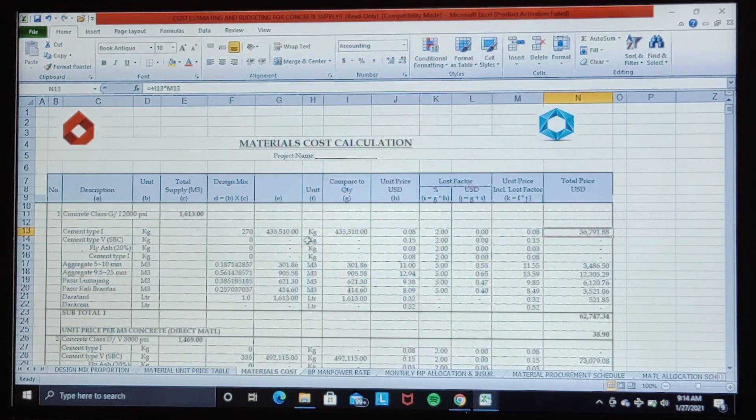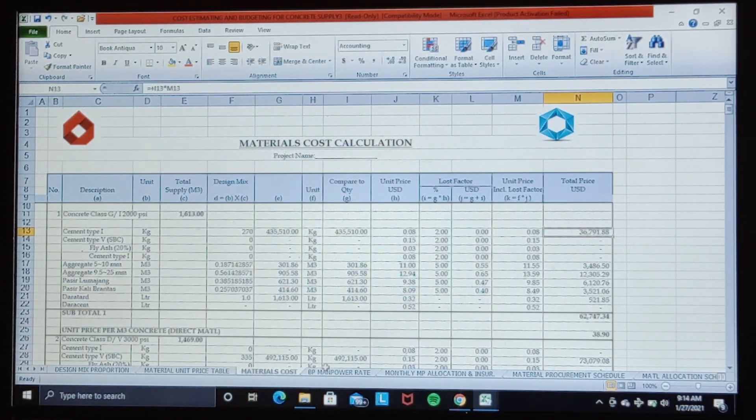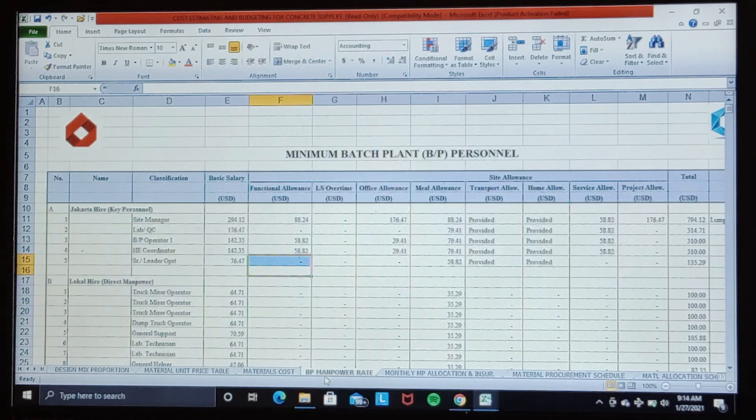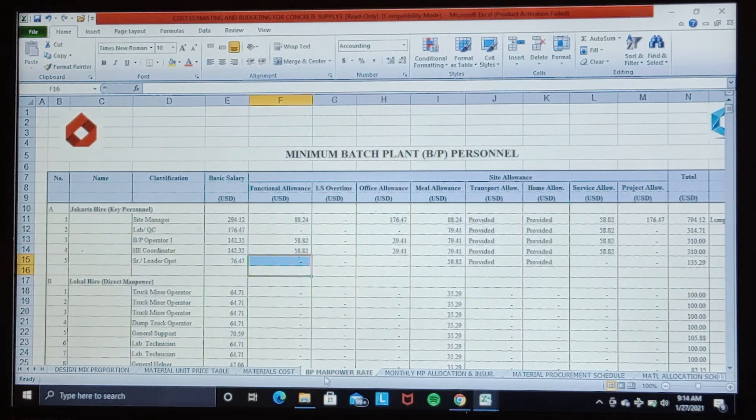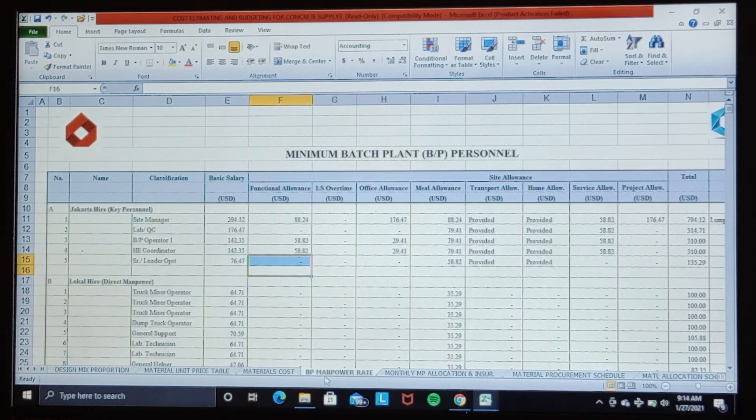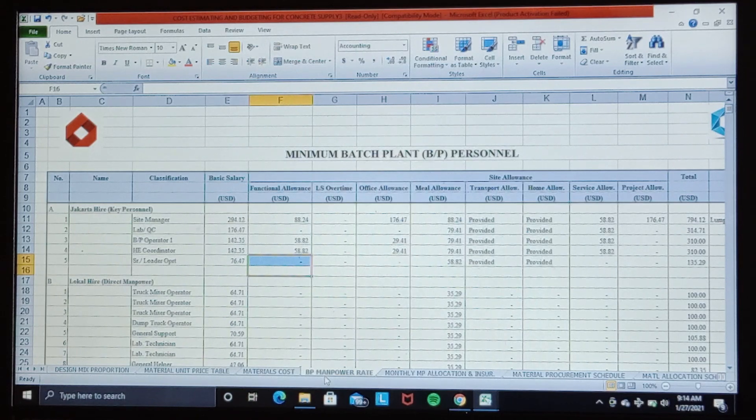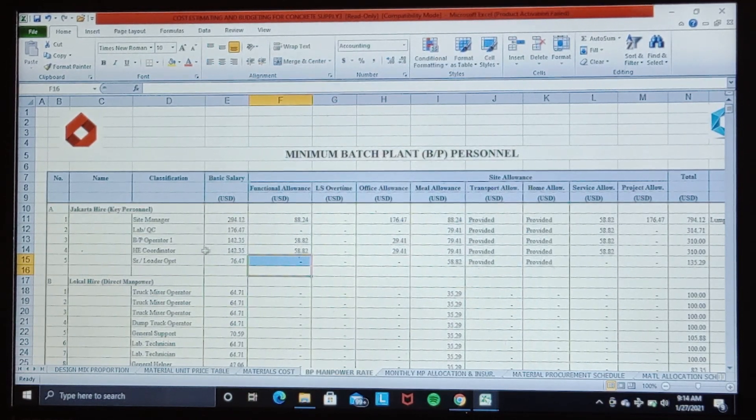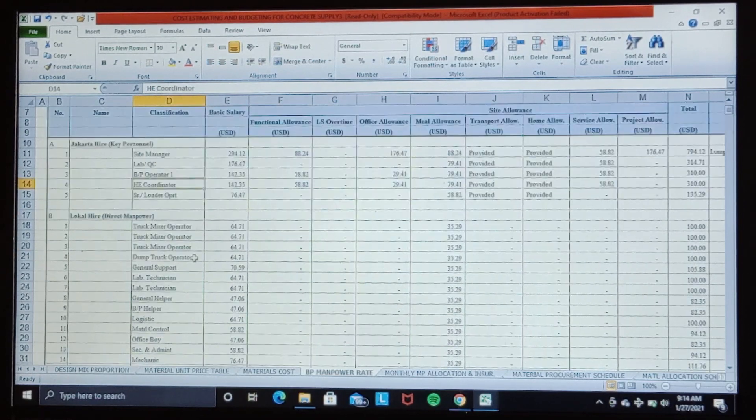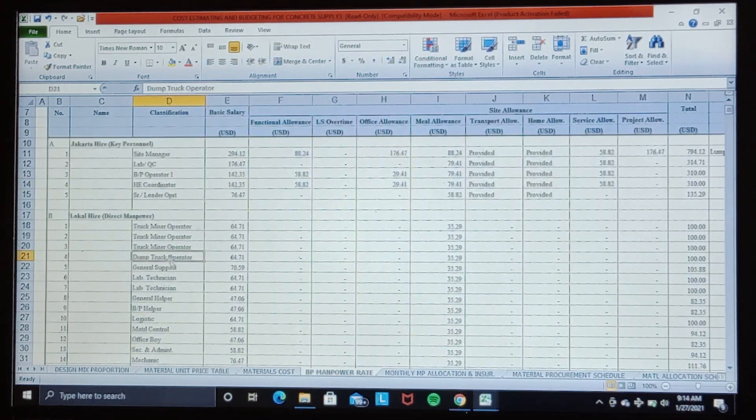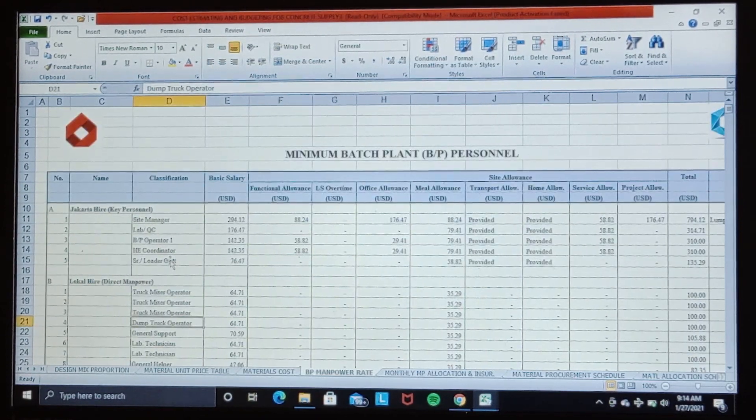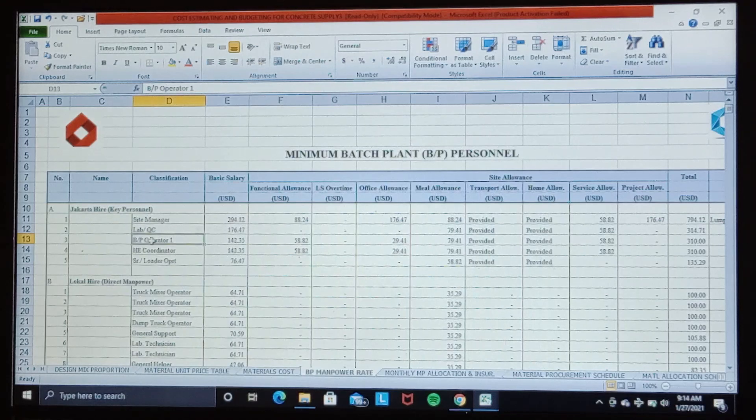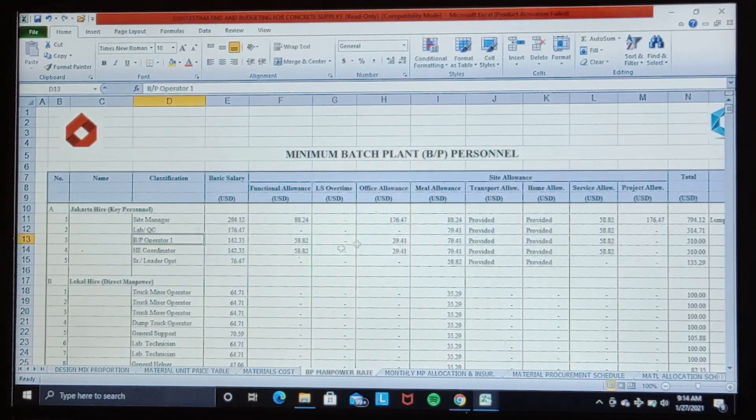Then we create a manpower table required to meet the contract requirement, complete with salary structures and other allowances for direct and indirect manpower. Then we calculate the monthly manpower cost for eight personnel.